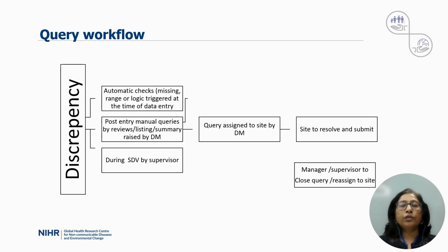This query workflow changes by the database we are choosing. You may want to have this workflow, you may want to have a different workflow, but it is important for you to have clarity on who raises the query, who corrects it, and who closes the query. Closing a query means if you're satisfied with the response, you close the query. If you're not satisfied, you send it back. If it's not resolvable, you close it, though it is not resolved.